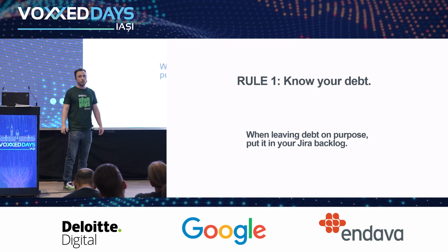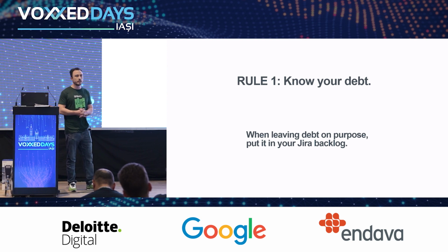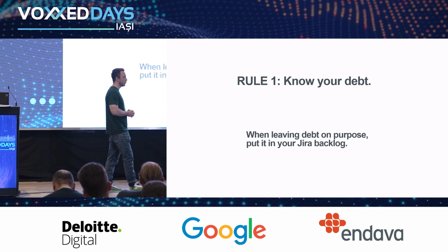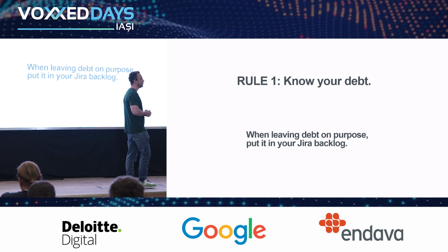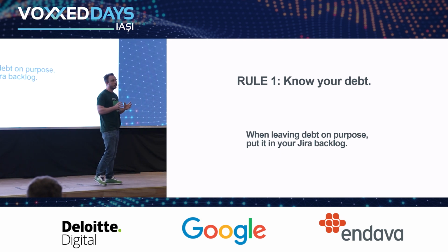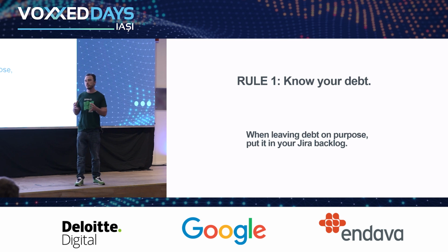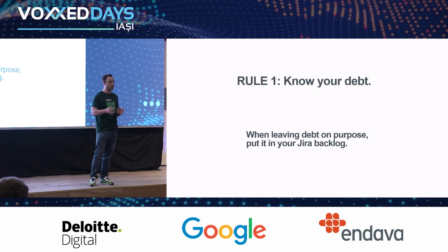So there are a few rules that I would like you to remember. Rules, I would say, from my experience. First of all, remember, when you do have technical debt that you want to leave behind, put it somewhere, make sure that you remember it. If you don't log it anywhere, you will forget it.